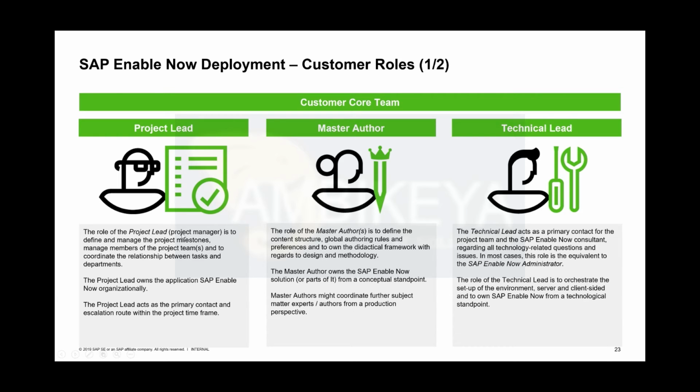And this project lead is one of the mandatory roles that we're going to request from now on. In smaller projects and enterprises, all this might be consolidated into one person, but we need to be precise here in being able to divide between the single tasks and duties and the cooperation duties of the customer within the project. So the project lead is the business owner, let's call it like this. Then we have a technical lead, which is the technological owner.